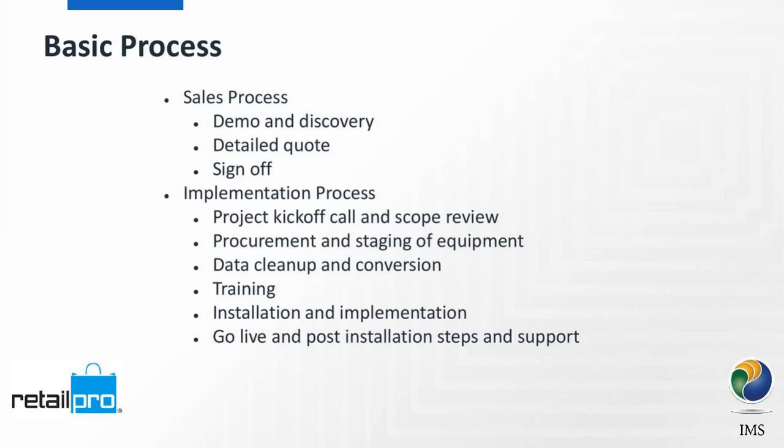If you are doing multiple steps such as e-commerce integration, I want to be clear that when we say 6 to 10 weeks, we're talking about the Prism upgrade itself really as a phase one. Some of those other things may go on during the process. Certainly, if you're getting a cloud server, that's going to be part of the upgrade process. But things like e-commerce integration, we may wait until that Prism is installed and ready to go, but you may start cleaning up some of your data or cleaning up your website as an aside to that. And then really to end the sales process is the sign-off. You say, yes, let's go for this, let's do it. Then we move into the implementation process.